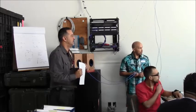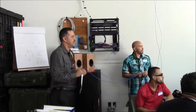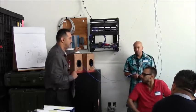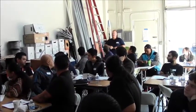Also, another thing is, after you pull the cable out of the box, look on the cable, there's foot marker numbers. Write the footage on the cable. Brandon is correct too. If you're running 2 cables per station, you want to get the closest box footings on the boxes together, just so you don't run out of cable. That's true, because you start with 1,000 feet.